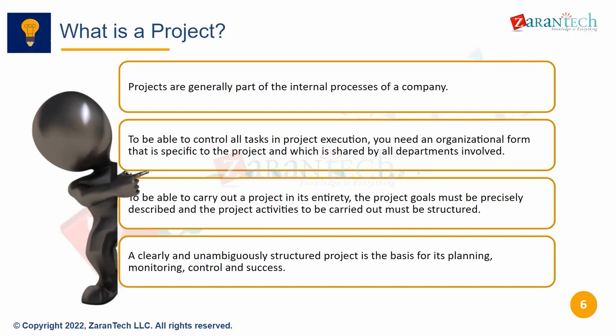If you want to keep track of material requirements, you have material requirements planning, which is MRP. The PP folks and the MM folks know what material requirements planning is. There are hundreds of materials, and you want to plan when you need each material and how much quantity you need. Those features are not possible with internal orders. You'll have to use Project System for that.